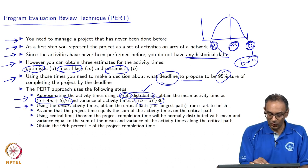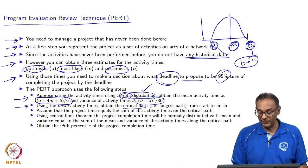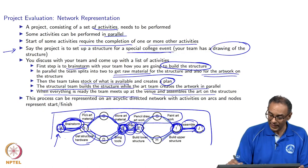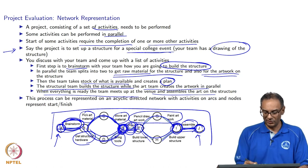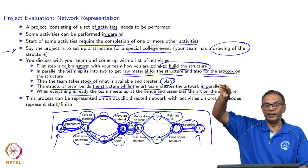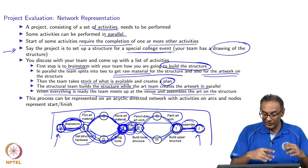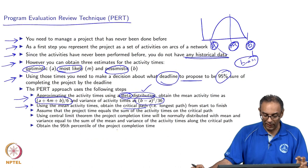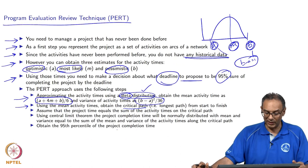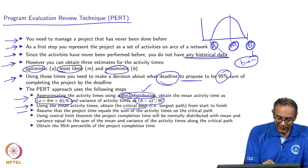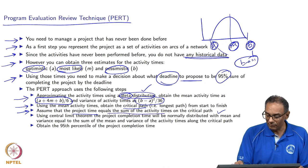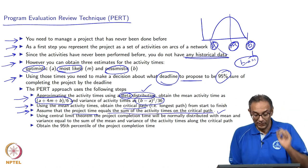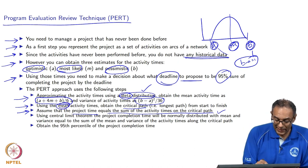Next, we compute the critical path — the longest path from start to finish, from node A to node J. We pick the longest path because that is the total time the project will take: even if the artwork finishes faster than the structure, you still have to wait for the longer activity before proceeding. The path times are random, unlike standard shortest path problems. We assume the project time equals the sum of activity times along the critical path, computed using mean values.